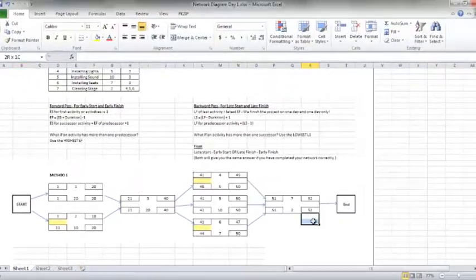So if we're calling these days, and we're saying right now this is day 52, we don't want anything to happen to make it go to day 53. And so what we have is work that has to happen exactly on certain days in order to make it to day 52. That's the critical path. That is the critical path.